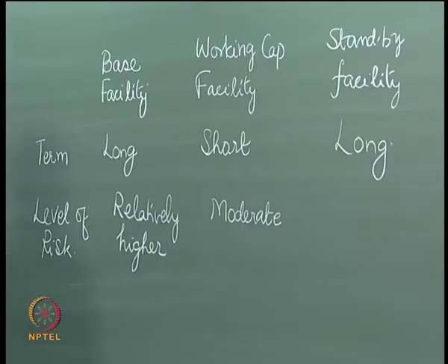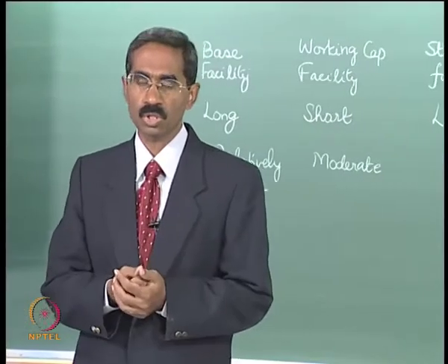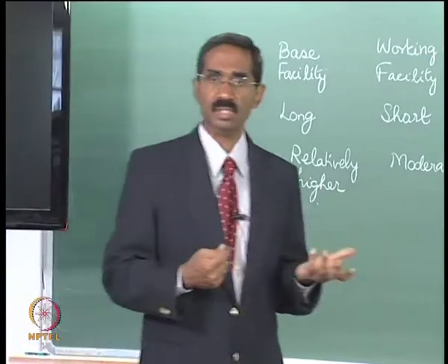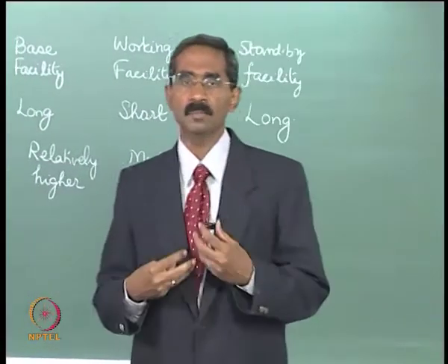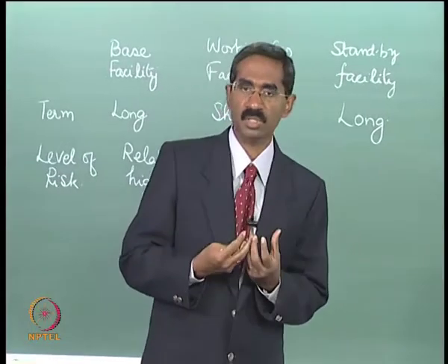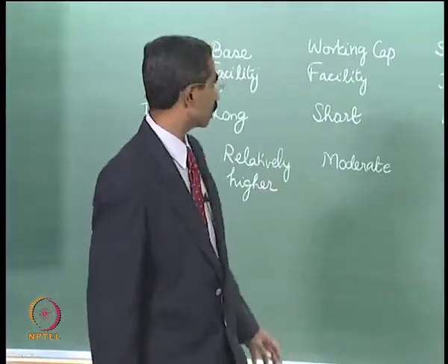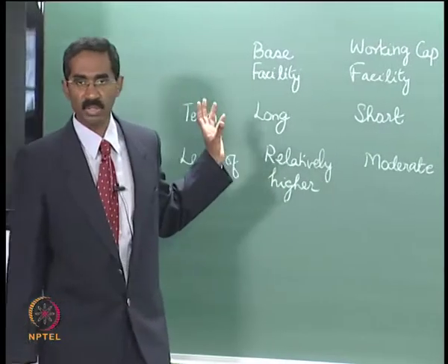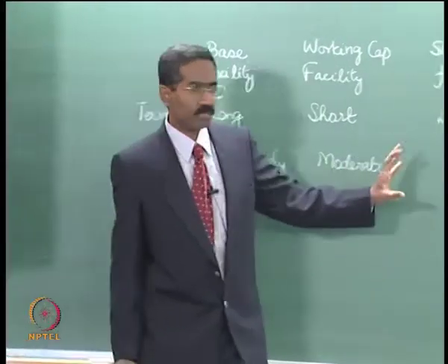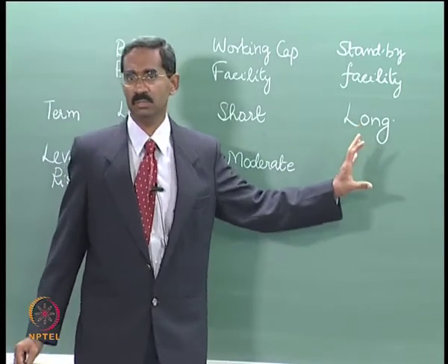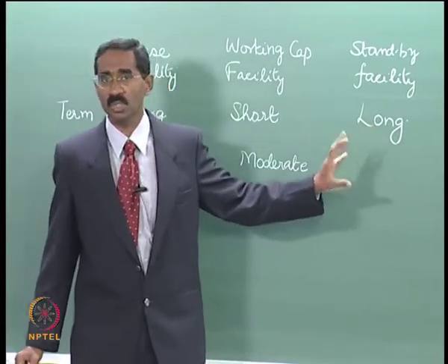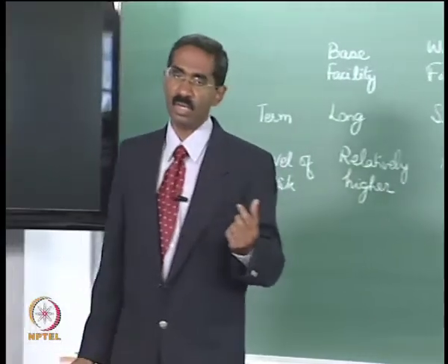And what we look at for a standby facility is a facility to be used when the expenditure exceeds the budgeted amounts, when there are any exigencies, when there are unpredicted expenses. So that is actually used to meet the financing needs. Therefore a standby facility is utilized only when there are situations which have not been accounted for at the budgeting stage.